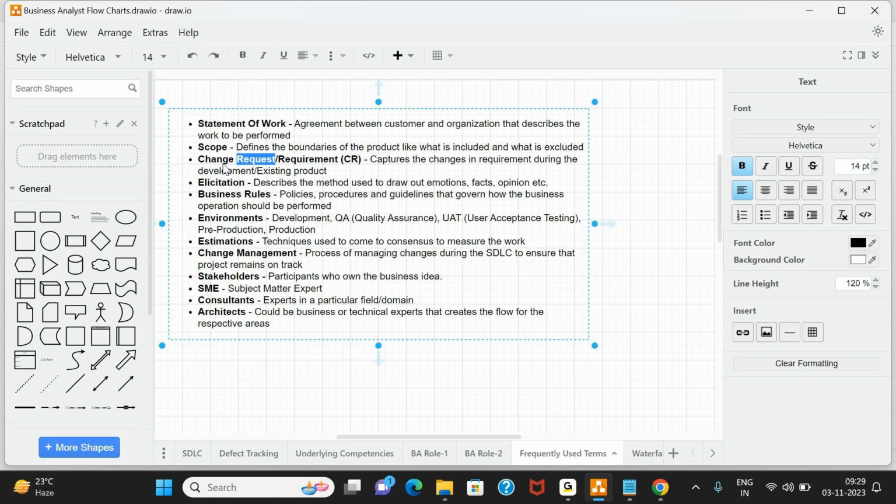If it's a very small request that you can easily accommodate without impacting project timelines, then you go ahead and make changes in your requirement document, then develop programs and test plan. But if it is a very big thing that may impact your project timelines, whether the request comes in during development of a module or of the project or when you are not working, then you need to have a change request.